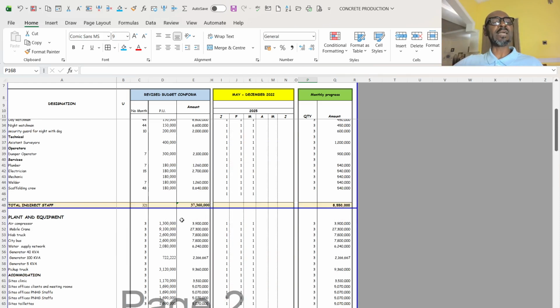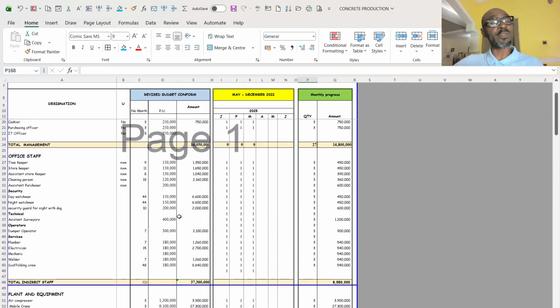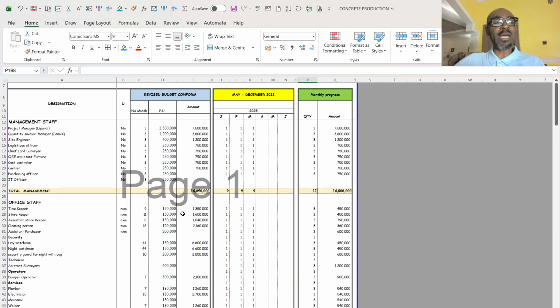And there is like the security guard, you can't place it to say concrete alone. It is serving the general purpose for that site. So whatever activity that will be done on that site in that month, the security has its own fair share and all of that. So now what I did was to compute the cost of my prelims for 3 months, which now